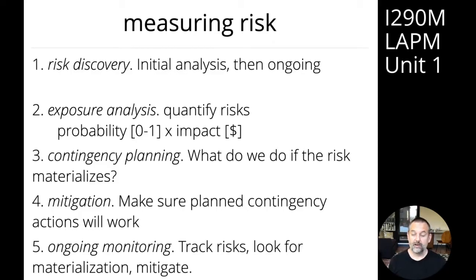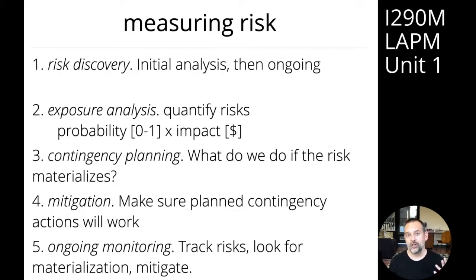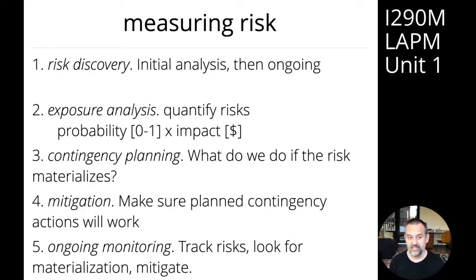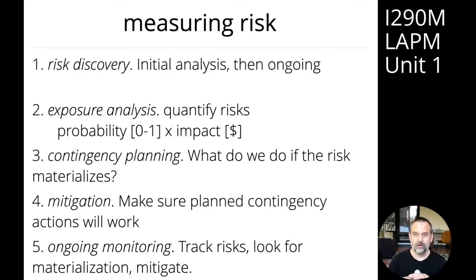Then we've got to think about what happens if the risks materialize — that's our contingency planning. Crucially, you want to make sure that you're not spending more money on the mitigation than the actual risk costs. This is another reason why it's important to quantify risks. If a particular risk is going to cost you half a million dollars, you shouldn't spend more than half a million dollars trying to mitigate it. It puts an upper bound on the amount of money you should spend on mitigation.